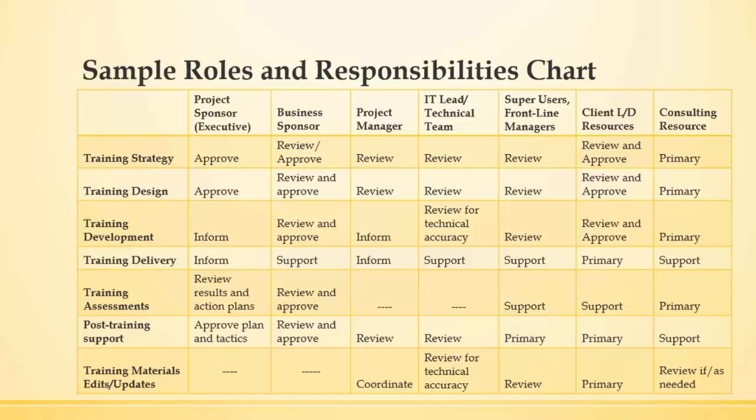I have found that the words I've used here can be helpful in having people feel included where you need them to feel included, and yet they put some boundaries around whose job it is to approve your work versus who gets to review your work. And there's a big, big difference. You don't want the head of the IT team reviewing your work from an instructional design perspective, not their job. But when you talk about the training development work, you certainly want to go to the IT people and say, could you review this for technical accuracy?